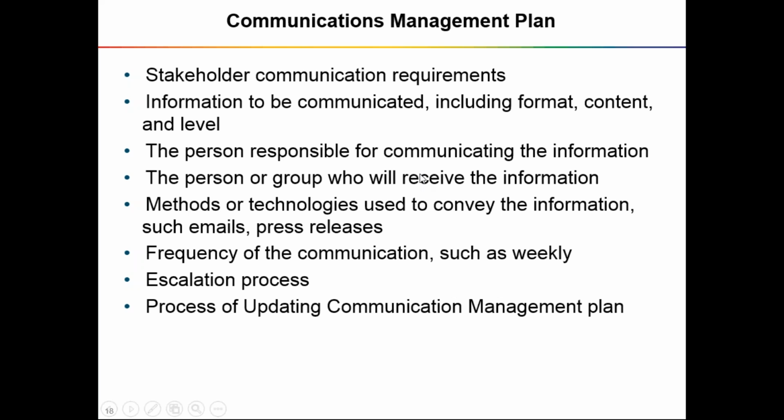The person responsible for communicating the information. Any plan we make, unless we have a person responsible for doing that activity, that plan is not complete. So we need a person responsible defined in our plan who will be doing that communication. The person or group who will receive the information, definitely yes, because there can be pull, push or interactive information for which we have planned. In all the cases, either it will be one-to-one or for a group. In both cases, we should know whom we need to send it to.